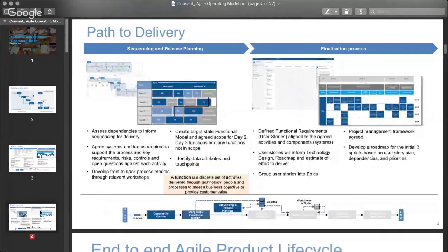All that means is things like, you have a list of functional requirements, and you have a list of non-functional requirements. Let's call them user stories, because we're talking about Agile. So you've got a list of user stories. They form what we call in Agile your backlog. That's just a full list end-to-end of all your requirements together, right? But you haven't looked beyond that at how to sequence them. And that's going to matter in terms of what are the dependencies between each one. Because there's certain things you cannot do before you do the other thing. So you need to be able to know what that is.